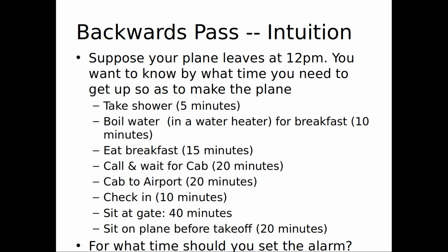Do you appreciate that issue? So working backwards is all great while it's in sequence, but then once it comes to things that can be done in parallel, you're going to be saying, okay, these can be done in parallel. Well, we need to start them by the earlier of the times any of them have to be started to make that plane in time. Okay?